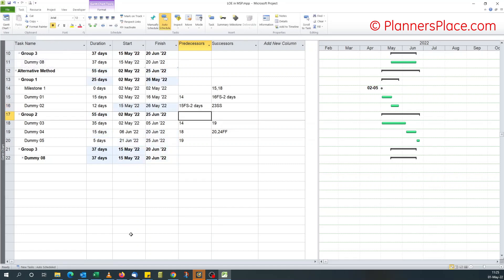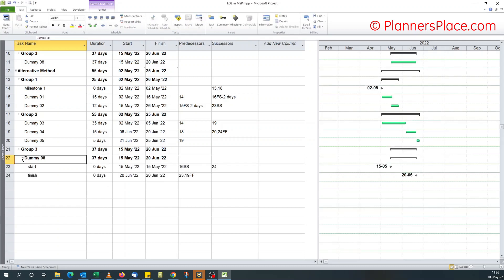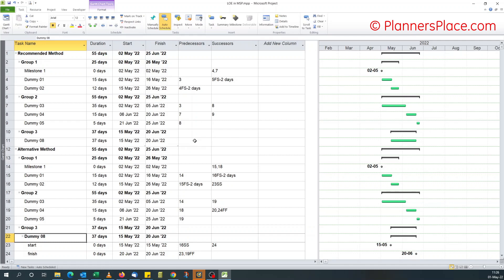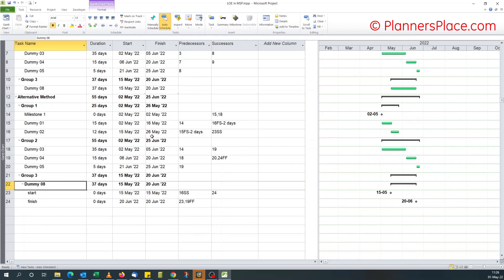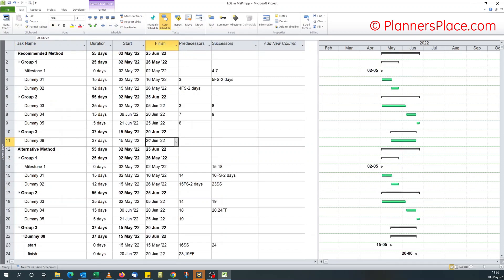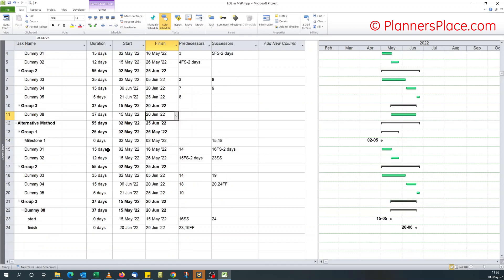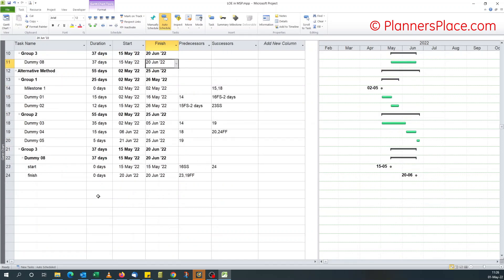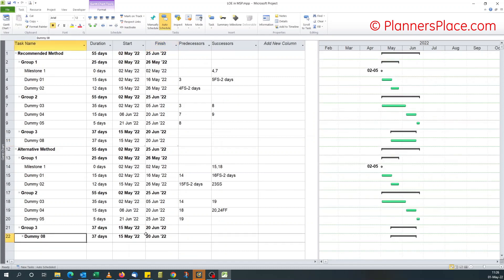Now, here you notice, because you've got this outline, it appears as a summary task. You click it and you see the logic. But with the recommended method, there's no predecessor or successor for you to see that it's linked to any other activity. You wouldn't know what's driving the start date, unless you're the one who built it or the schedule is well documented with notes. Here with the alternative method it's easier — you can see that. The only problem is it's coming out as a summary task.